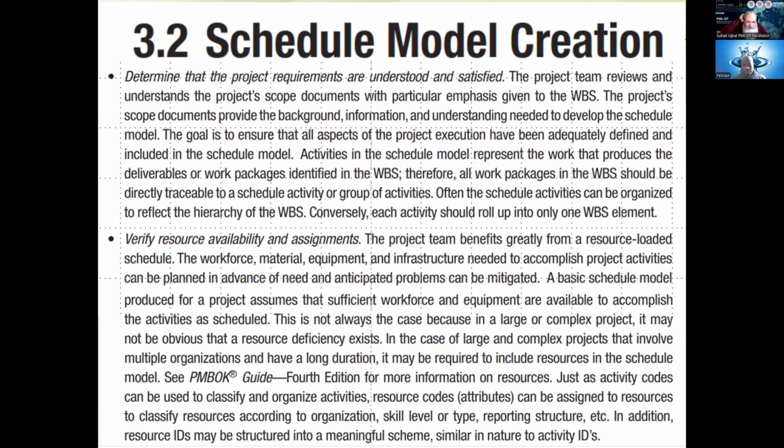So just as the activity code can be used to classify and organize the activities, resource codes can be assigned to the resources to classify them according to the organization. Similarly, according to the organization, skill levels, types, and reporting structures are all affected by these coding systems. And by the way, you could create some relationship between the activity codes and the resource codes. In addition, resource IDs may be structured into a meaningful scheme similar in nature to the activity ID.